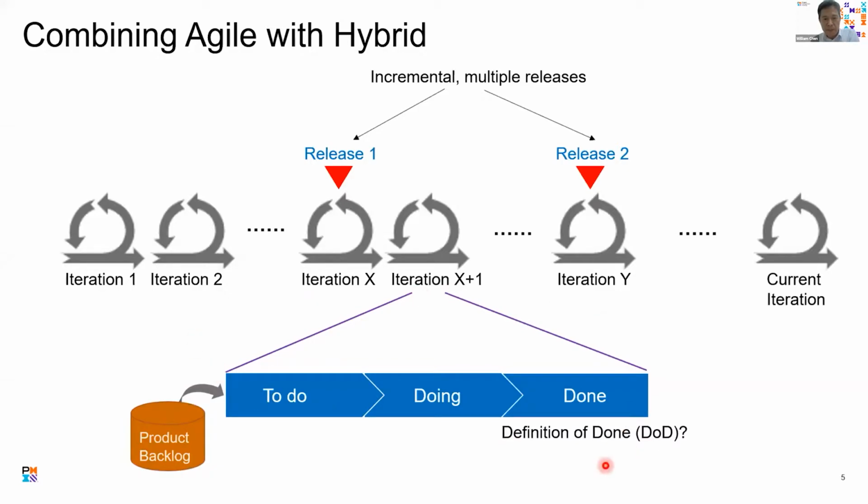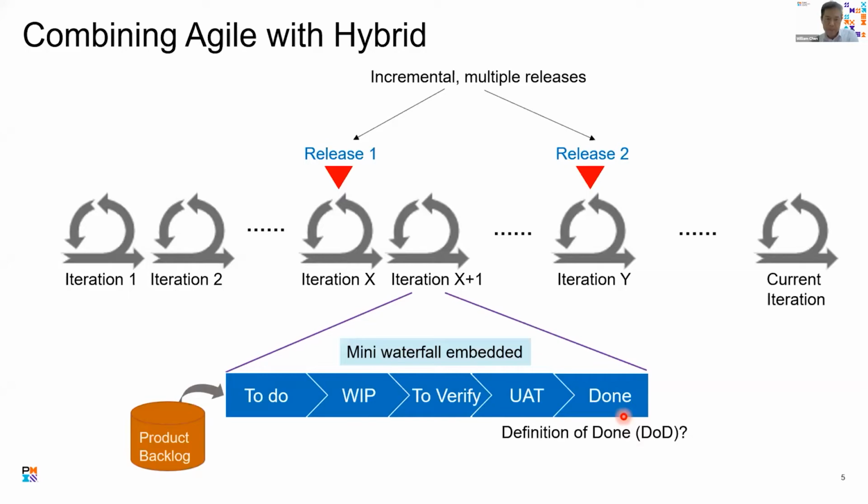So when we do these pure Agile practices, and we rely on our developers to do a lot of things on their own, it's like I just said, our people are from different backgrounds. Not everyone can do everything end to end. So faster or shorter iteration cycles probably cause some quality issues. So later on, we switched to a little bit of mini Waterfall.